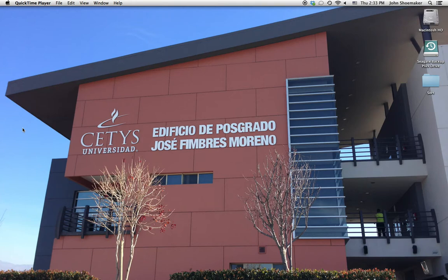Remember, there's a difference between a budget and a cost estimate. A cost estimate is a number, although it may be expressed as a range. And in fact, I would certainly recommend that you do that, rather than simply coming up with a point estimate as to what the project is going to cost. Come up with some kind of range, because you never know what's going to happen, and that range gives you a little bit of leeway in terms of your estimate.